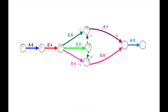Moving to the right, we can see that 19 plus 7 is 26, and after G we get 25. So 26 is our best value, and the remaining value is 31 at the completion of our network. We can see that the critical path is A, B, D, F, and H, and the time it takes is 31 days.